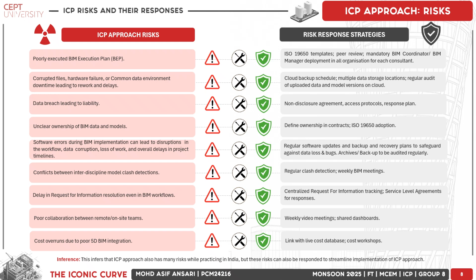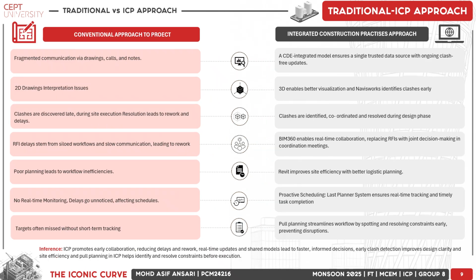To mitigate these, we adopted ISO 19650 templates, cloud backup schedules, access protocols, defined ownership clauses, regular software updates, weekly clash detection, centralized RFI tracking, video-based coordination, and live cost databases. The inferences indicate that while ICP adoption carries multiple vulnerabilities, structured response strategies can significantly streamline BIM workflows and reduce project uncertainties. Now moving on to the benefits of ICP approach over traditional approach towards project.